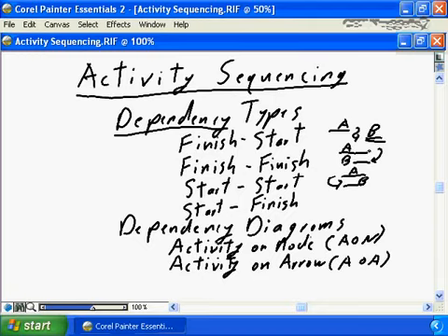Often used where you have a series of tasks that will finish and result in the combination of a milestone for a phase or a component for your project, where the final tasks for the phase would have a finish-finish relationship on the milestone itself. A similar style of dependency is a start-start, where you're saying B cannot start until A starts.